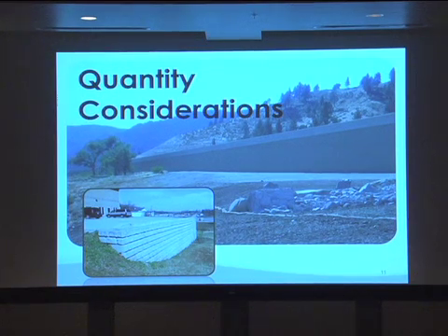Now's when we got to start really looking at our data. Besides the quantities, and like here, you know, if I got a retaining wall that's about 10 feet high and 200 feet long, that's certainly different than one that's a mile long and 25 feet high. And all of those things start being taken into account. Who's the prime, who's the sub, what's the quantity, who's doing the work. And luckily, we can start seeing this.